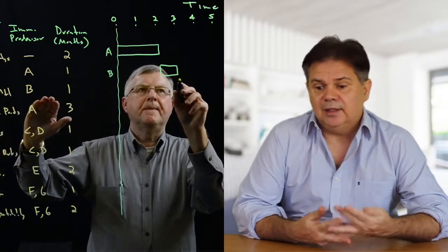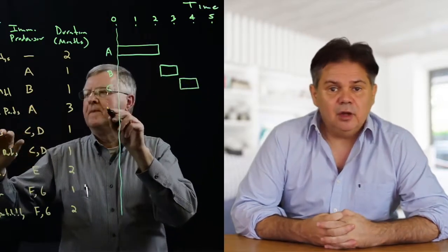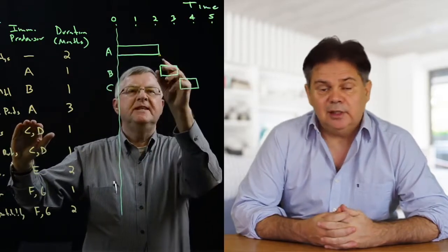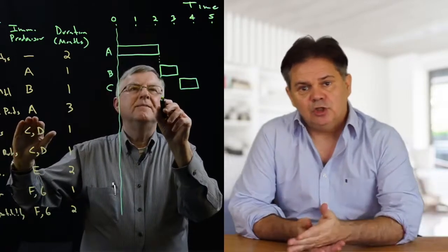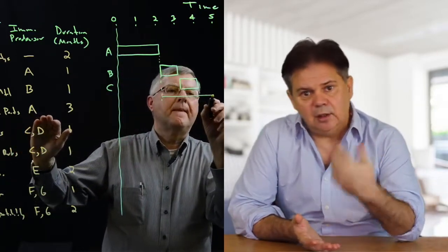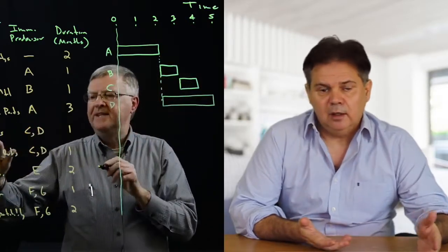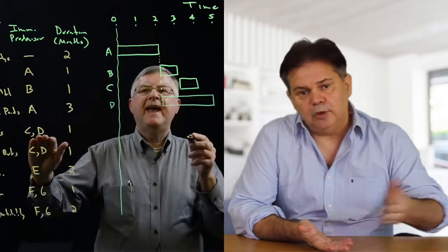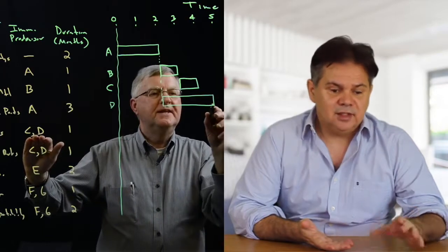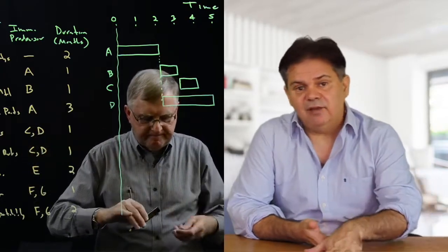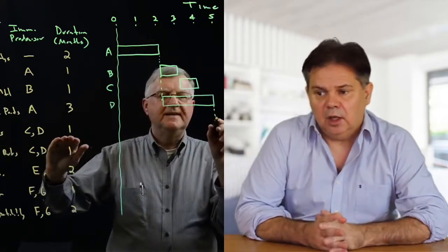So for example, let's say one activity is to develop the content of a video. That means I'm going to need images, do the processing in the video, do the montage, show it to people, get a selection, and then apply it and do everything I need to do from a process perspective, and then it will be ready. For every activity, I'll put a certain time it will take me. To complete the whole task and deliver this box, it's going to take five activities, about two days. That's the idea, to get an estimate around the time.